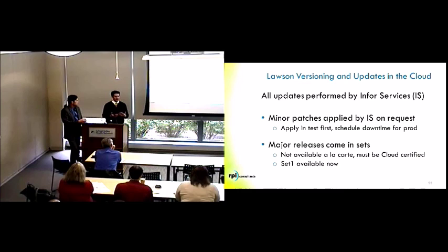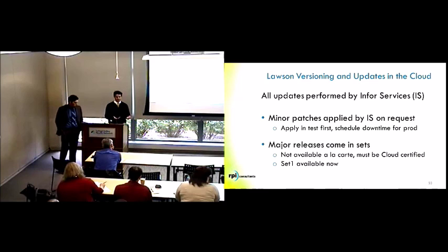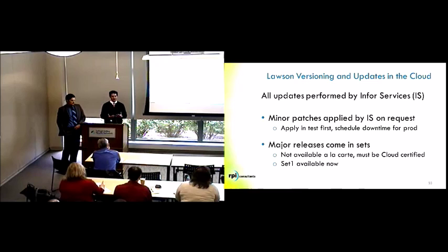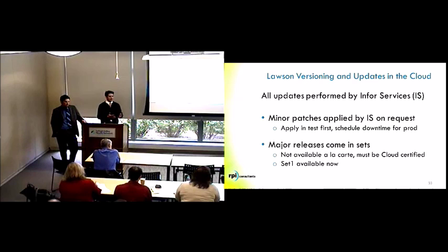It's a little bit of a balancing act, but the information we have, it looks like every 6 to 9 months, one of these bundled, pre-certified families of updates will be made available to you. And by the time they do come out, they're oftentimes updating something that really needs to be updated at that point. For example, ISS is one of the components of the overall system that you can't a la carte update independently. So if your project encounters a need to update ISS, you may be forced to take that set update. So it's always a good idea to try to plan your windows and your project gates to allow for the latest and greatest set update throughout the course of the timeline, if that makes sense.